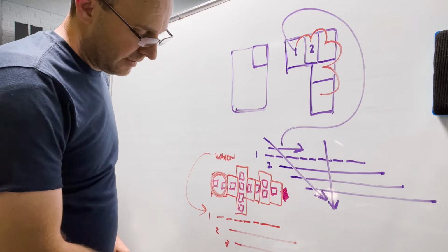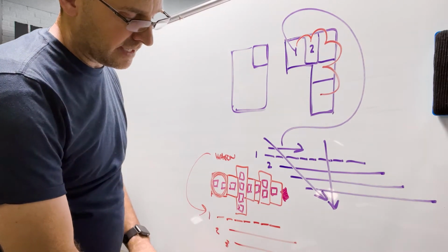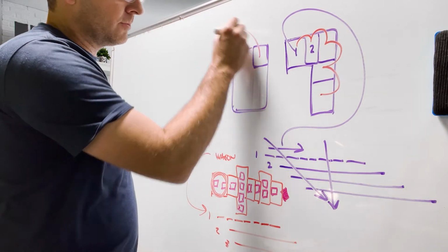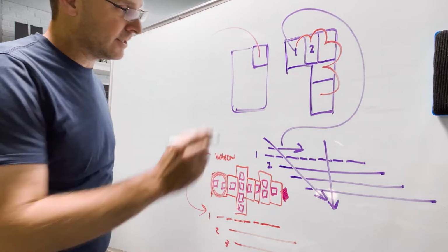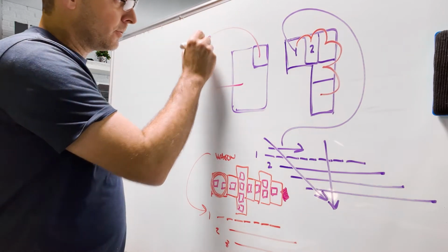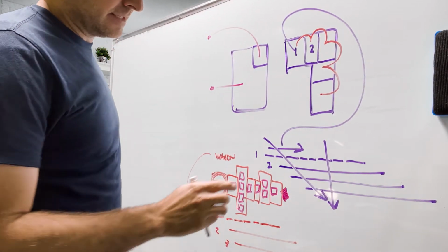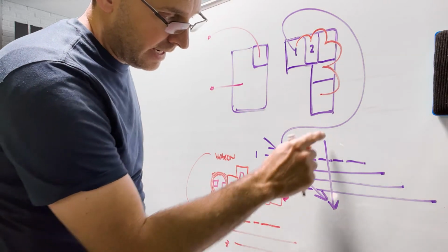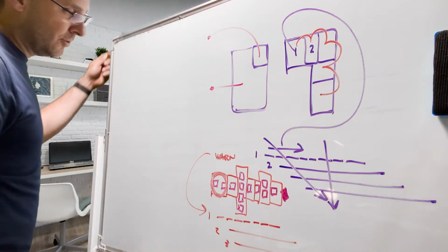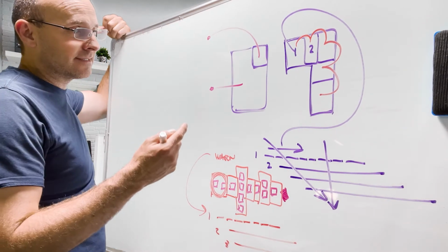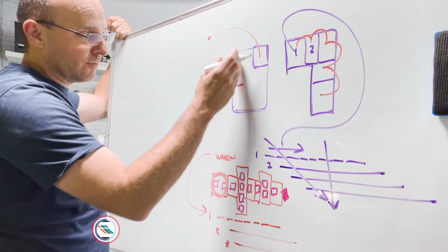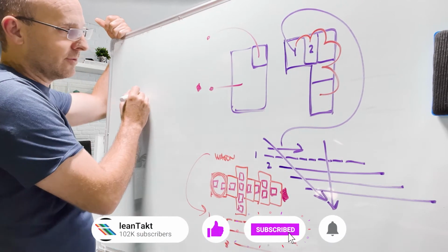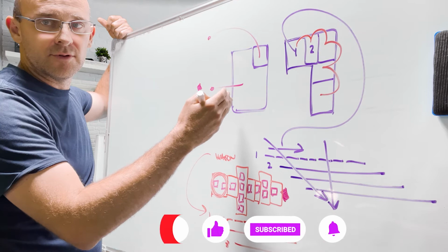If you have a pull plan for the cafeteria or the auditorium, usually we would say, hey, we're going to pull plan this cafeteria, we're going to pull plan this auditorium. The problem with that is it ignores this line right here, the trade flow and the logistical flow. So pull planning most of the time asks, hey, here's our milestone, when do I want to be done with this whole area? And then people are like, well, let me pull it backwards. But they're pulling through the whole area.